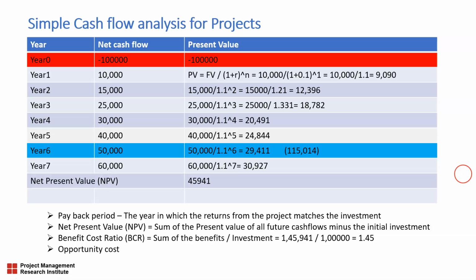One of the key reasons for project failure is a lack of business case for the project. So we jump into projects without doing the cash flow analysis. That is a very big risk, which will get revealed when the project is halfway through, and by the time a lot of investment is made, if there is no business case, the stakeholders will lose interest and the project will become a disaster.